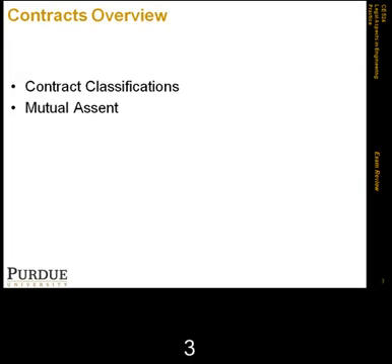We also had something called letters of intent, which is again a possible manifestation of mutual assent, where one party wants a performance to start before a full agreement is reached, and they issue a letter of intent telling the other party how they would pay them for the work they would be performing under this agreement to agree.